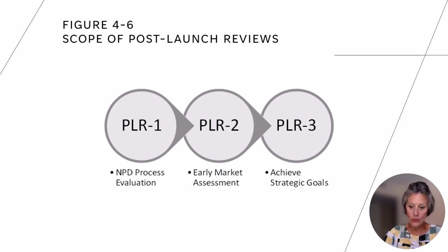Post-launch reviews. A post-launch review, PLR, evaluates the effectiveness of the project team and processes, as well as the initial acceptance of the product in the marketplace. As in any lessons learned review, the PLR focuses on learning and improving by asking what went well on the project, what practices or policies did not serve the team or project well, and what could be improved next time.